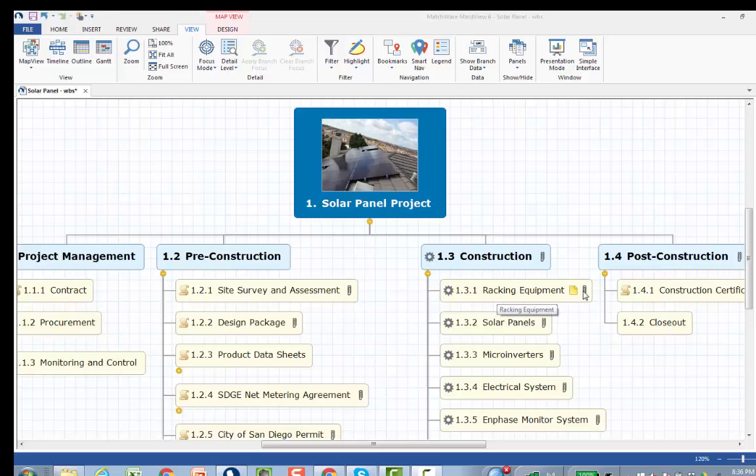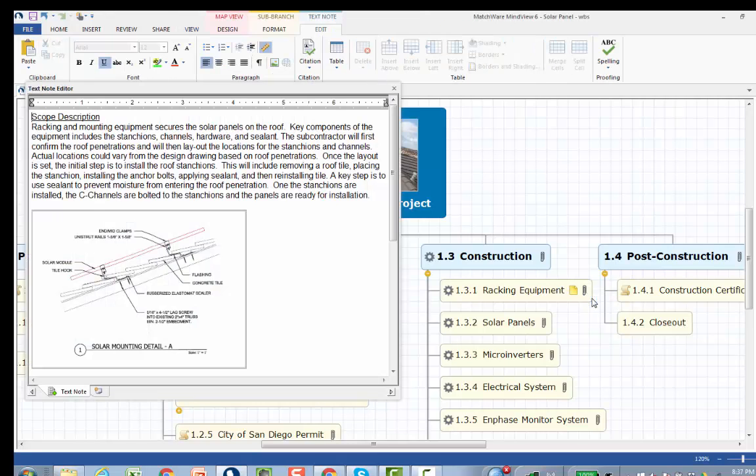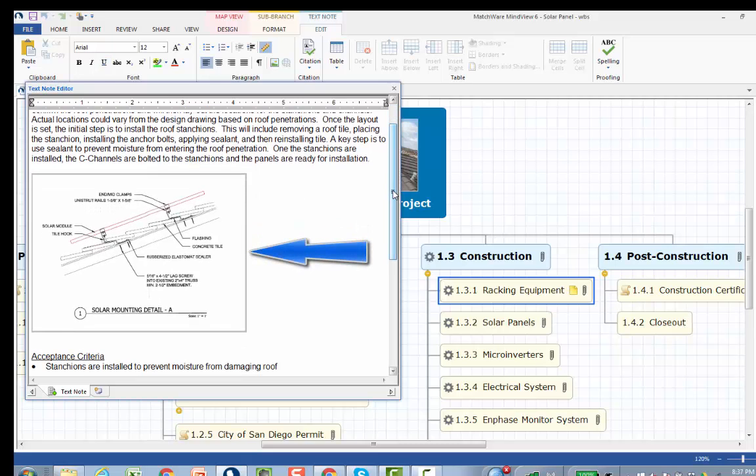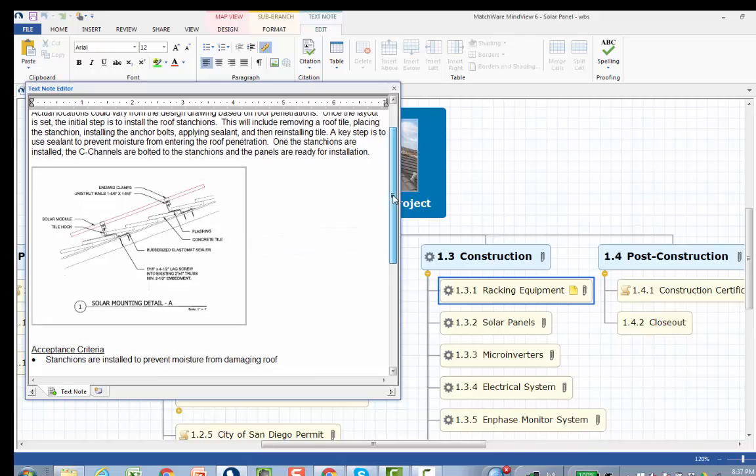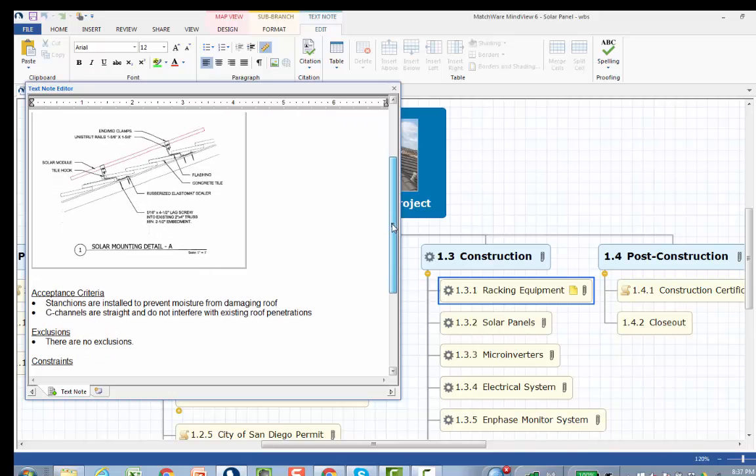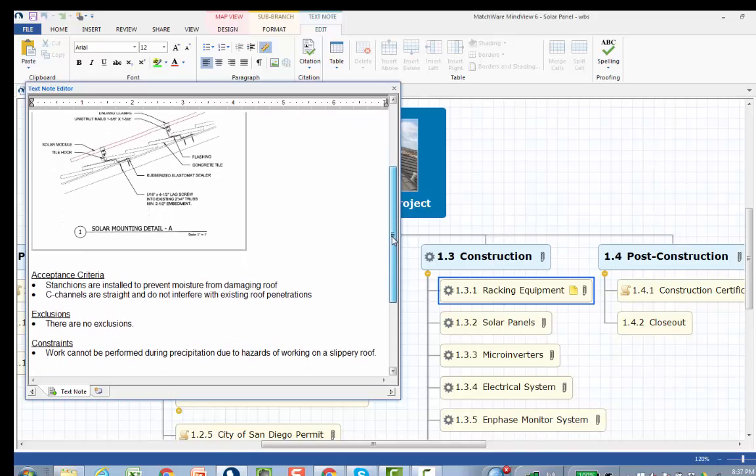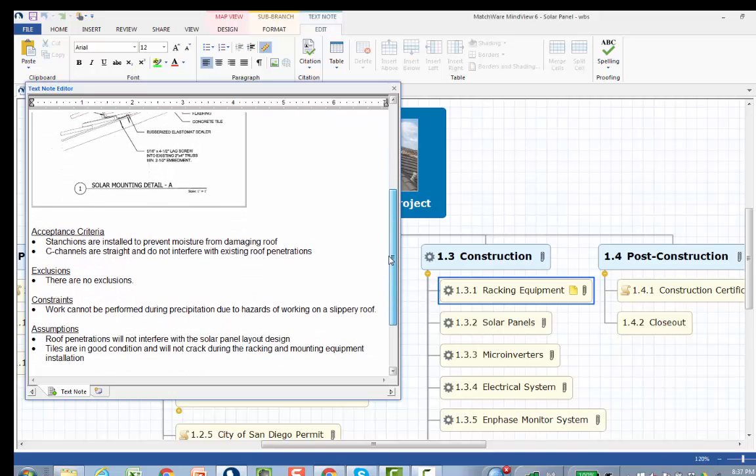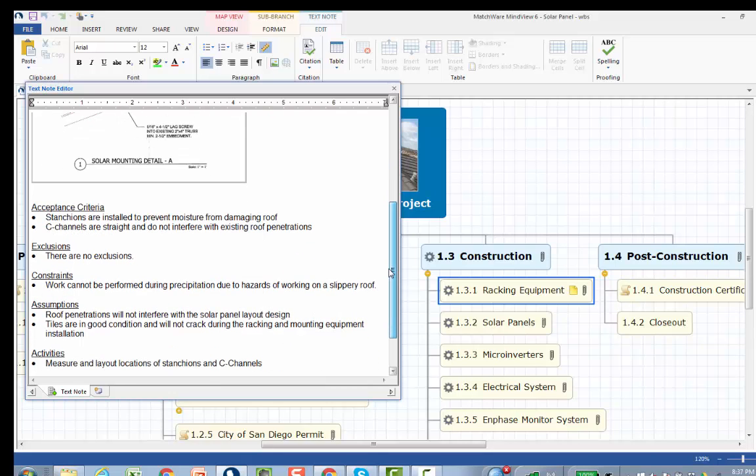Racking equipment. If I open the text note editor, we can see the scope description. This was a copy and paste from the statement of work. I then did a screenshot of the drawing detail and was able to paste that into the text note. Further brainstorming and meetings with the project team, I added acceptance criteria, exclusions, and constraints.